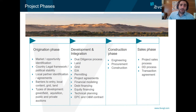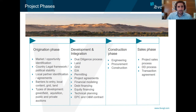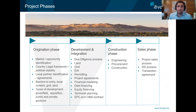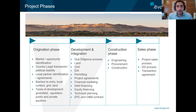For the origination phase, we start off by looking into specific market structures. We look into country legal frameworks, barriers to entry, and the type of projects we have on the table, which range mainly from greenfield development, where we develop projects from the ground up, or through brownfield developments, where we acquire pre-developed projects.